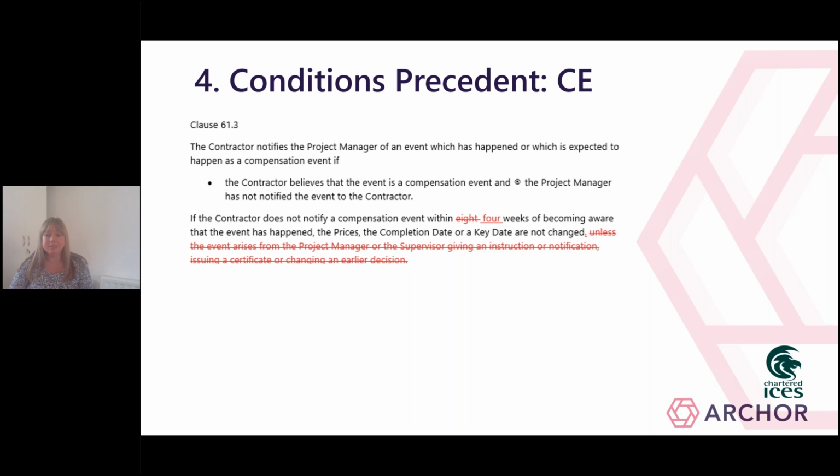or the completion date. Now, condition precedent clauses are often argued about by lawyers, and they can sometimes be hidden away with clever drafting. It's important to note that no special form or words need to be used to create a condition precedent. In particular, the phrase condition precedent itself does not need to be used in order for the clause to operate in this way. However, it must be clear from the wording that the performance is conditional upon the specified event occurring.